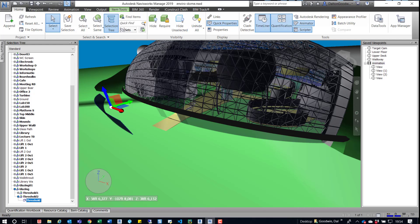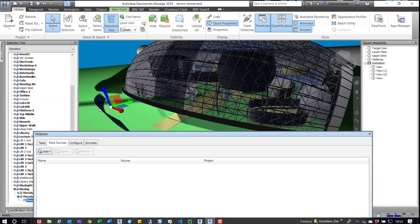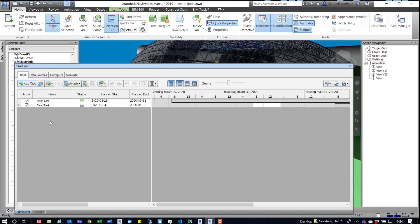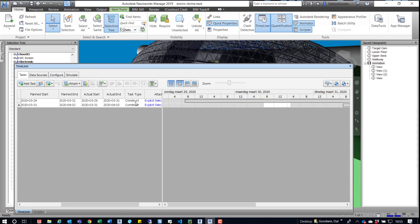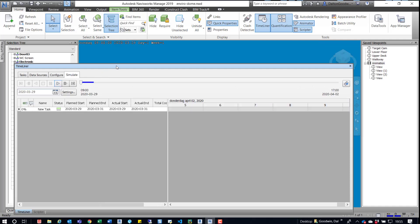Let's jump over to Timeliner and take a look at what's going on there. As you saw, there are two panels — this one and this one on the front of this building. I want to go to Tasks and create a task for each of those. We have a task with planned and planned end dates, but those are irrelevant because our simulation settings are set to use the actual start and end date. The task type is set to Construct, meaning these elements are being constructed, and we manually grab those items and attach them. From there, we jump over to Simulate and can actually play that out.